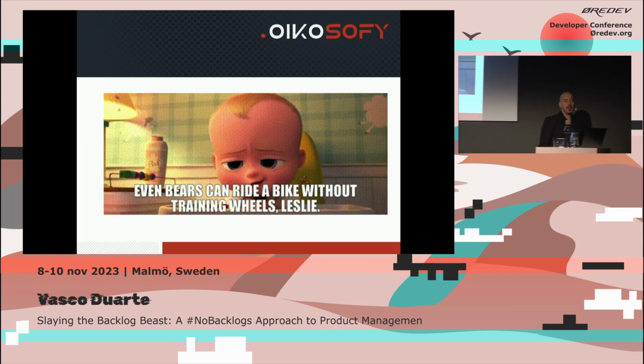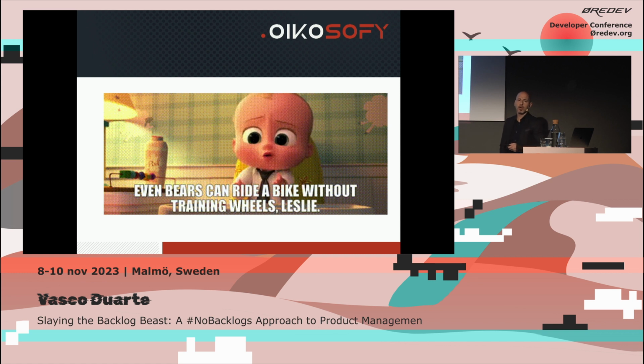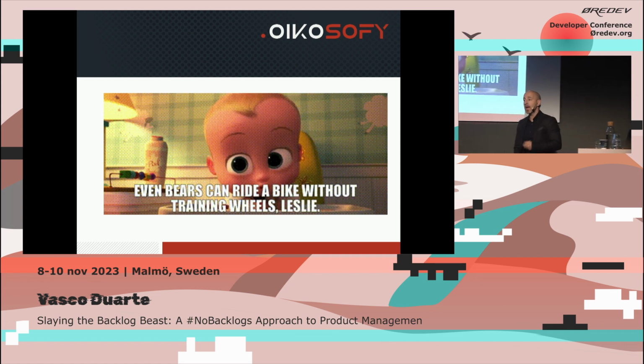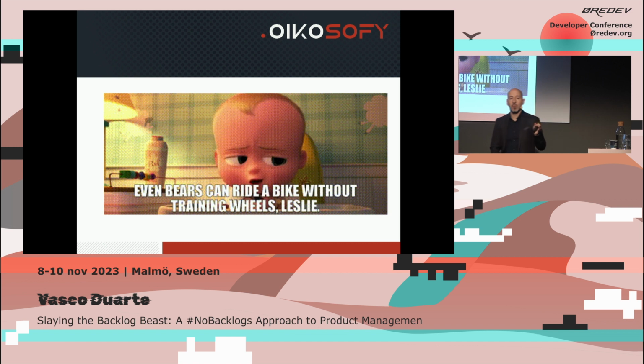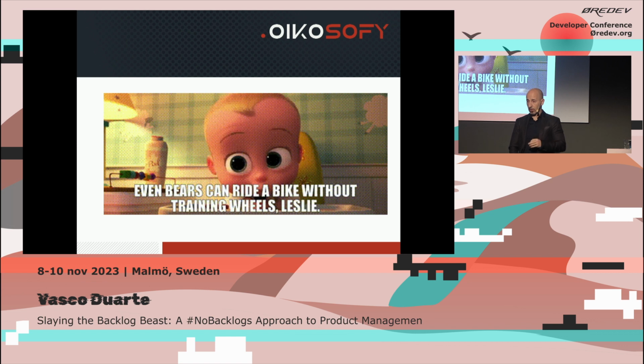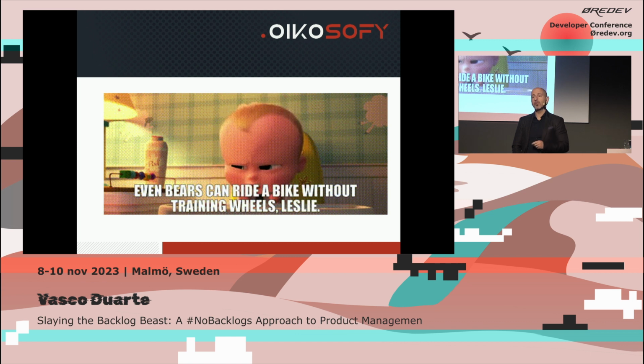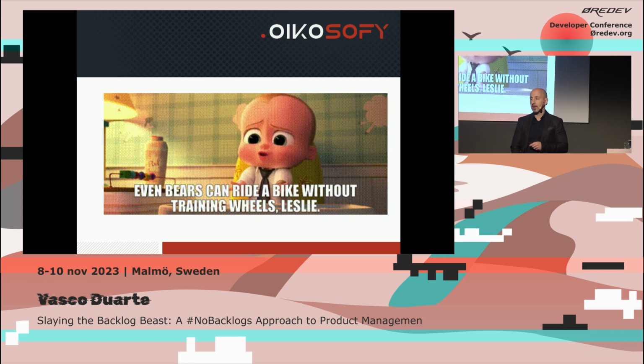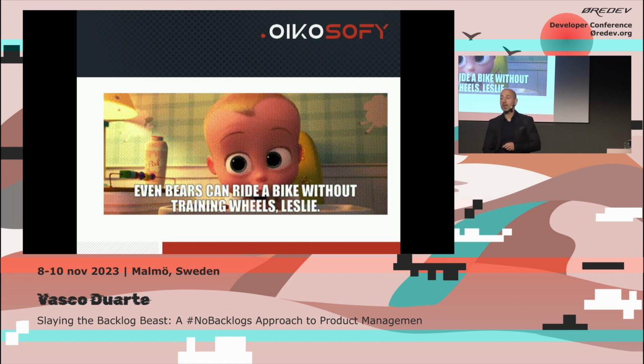So backlogs were a little bit of training wheels on our agile bicycles, and they actually made sense. If you think about Scrum as it was originally defined, a set of patterns, it's not even very long, a few pages, easy to explain. Scrum also had a role that was critical to make backlogs work. That was the product owner role. Many of you are probably not old enough to know that the product owner was the single wringable neck. It's not fashionable to use that term, but that was the core aspect of that pattern.